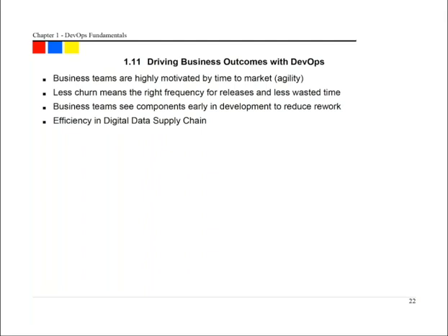Frequent small changes help business to adapt to what they learn and to competitive activities. So think about the difference on the big picture. In a classic enterprise environment, we build these enterprise applications, and typically it takes anywhere from, say, 6 to 18 months between when we gather requirements and when we actually ship something into production, where customers actually see it. And it's usually kind of on the higher end of that.